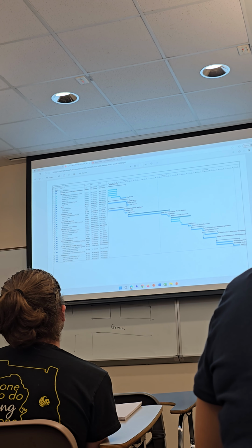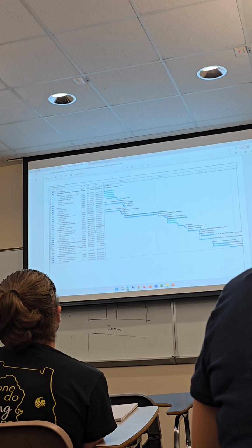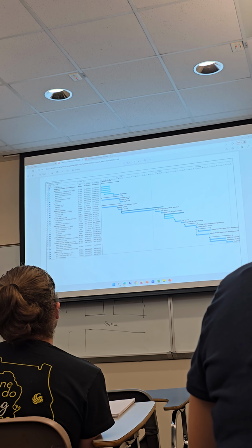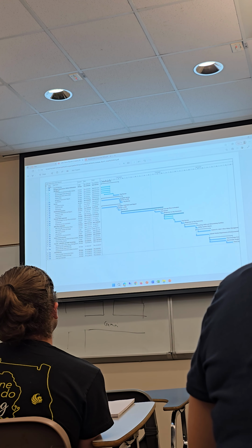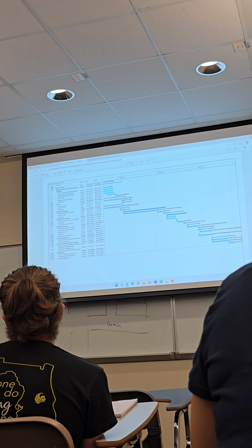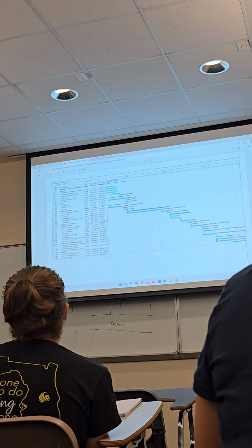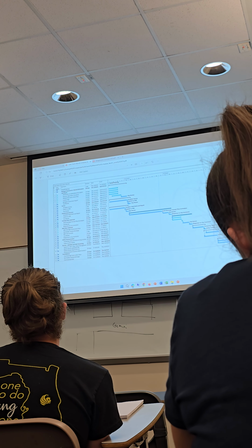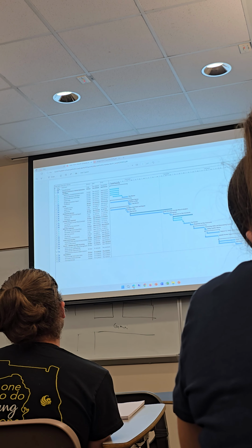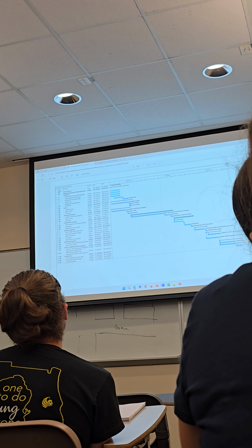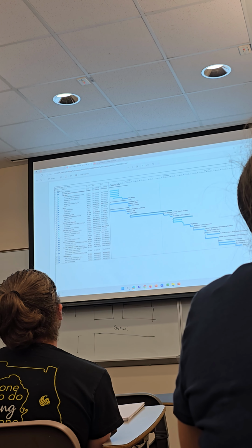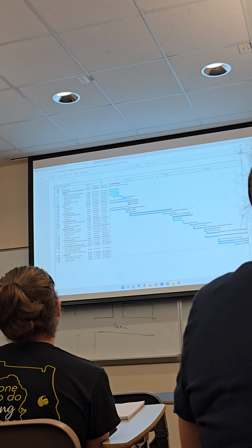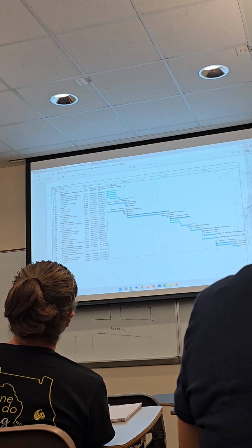So you wouldn't submit your permit applications and then just stop and wait. You're going to keep moving in order to meet whatever schedule you have to meet. So for your particular case, what I'd like for you to try to estimate as part of your schedule is that data collection phase. You just focus on survey, geotechnical, and environmental. And then think in terms of a conceptual set of plans.